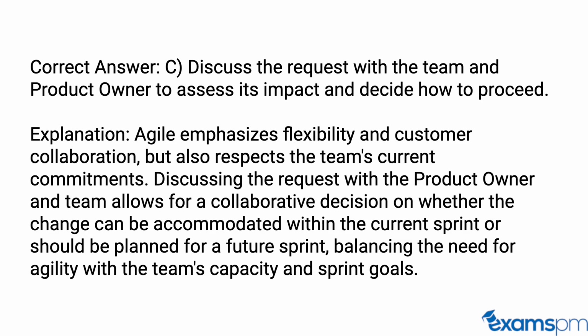Correct answer: C. Discuss the request with the team and product owner to assess its impact and decide how to proceed. Explanation: Agile emphasizes flexibility and customer collaboration, but also respects the team's current commitments. Discussing the request with the product owner and team allows for a collaborative decision on whether the change can be accommodated within the current sprint or should be planned for a future sprint, balancing the need for agility with the team's capacity and sprint goals.